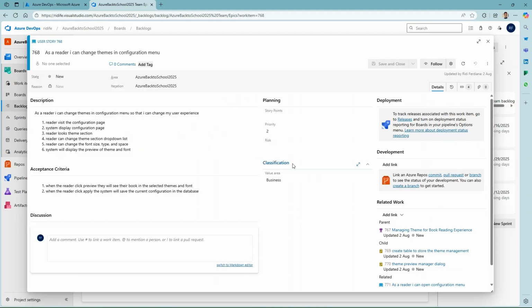several things that we need to know. The first thing first, you will find story points. Story point is about how to estimate the user story based on several ways, such as t-shirt size, the power of two, and also the Fibonacci numbers.